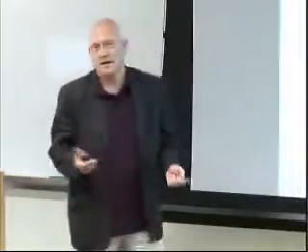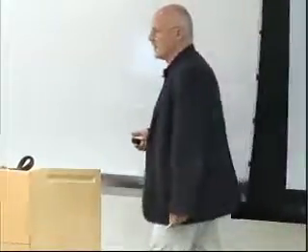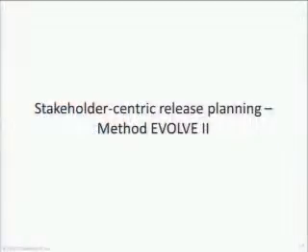So all these decisions are made ad hoc, which is zero investment, but you have a lot of trouble later on if you understand that for deciding the way you decided with all these features, you might need more time or more resources or other things, and that is typically not available, and then you need to adjust your release decision and so on and so forth. So that is the zero investment alternative, which is not a good one, I think.